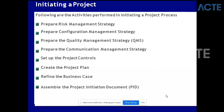The risk management strategy is a tracker in which you will start creating risks - risk one, risk two, risk three - what is the mitigation and what actions are taken. Configuration management is versioning - how you're doing versioning, you will agree on a versioning strategy. Quality management strategy is very important because the product you get should be of good quality - it should pass all the acceptance criteria, all the tests. We should not allow any P1 or P2 defects. Communication management strategy is the governance - how you are going to tell the stakeholder, how you will have weekly meetings, what formats you will use.